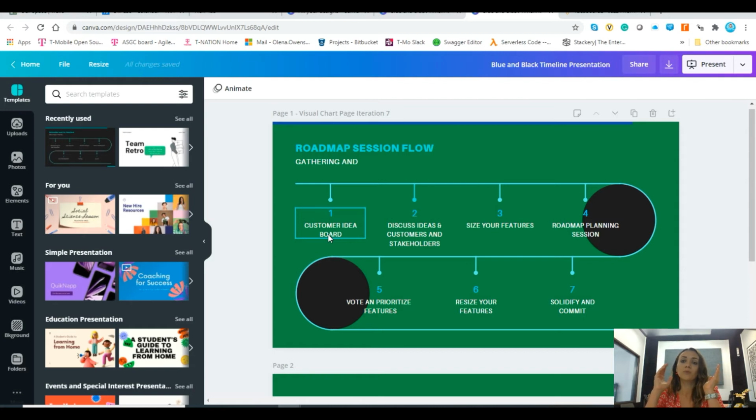So it's about 600 points then per quarter, since there's 100 points per sprint. So now you say, okay, 600 points. Let's look at the features. We have a prioritized list of features that we've combined from our customers plus our needs and the non-negotiable from stakeholders. Now we have to size them down. We don't know all the details yet, and a lot of times we haven't done this job before, so we have to kind of t-shirt size it. How big is it going to be? How complex is it? And we can size them approximately.